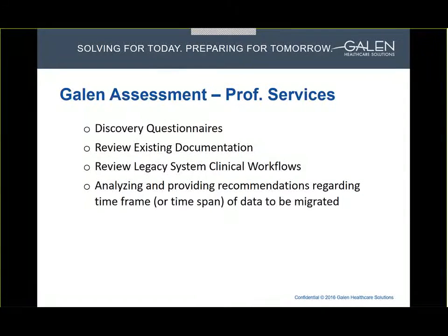Another important facet of the data migration process is knowing whether or not you have any upgrades planned during the data migration. And so this is another question we like to ask, as upgrades can often impact the availability of your EHR or ancillary systems, and in this way, they could also have a large impact on the migration timeline itself. If we don't account for any planned upgrades, these delays could set the project back significantly. So again, knowing about these upgrades in advance is very useful for planning.